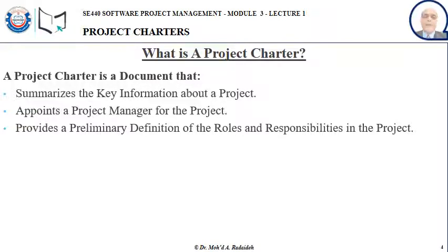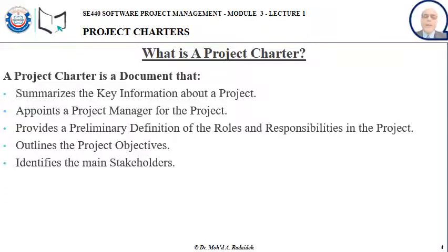In the project charter, a preliminary definition of the roles and responsibilities of the team will be provided as well. The project objectives will be outlined in the project charter. The stakeholders will be identified in the project charter as well. The authority of the project manager will be defined.